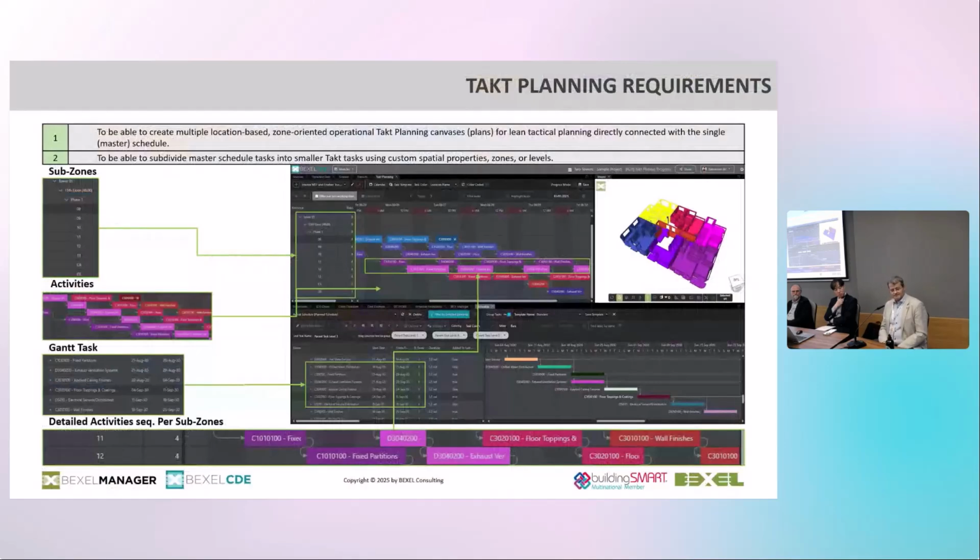an important thing. Also, the connection between schedules should be on a strategic level, but I don't want to use the same level of granularity on site. I want much more detailed information on site. For example, in this particular case, one single task for painting partition walls on one floor of the building is what a planner, if we are happy, will do. Sometimes he will say partition walls in the entire building as a single task.